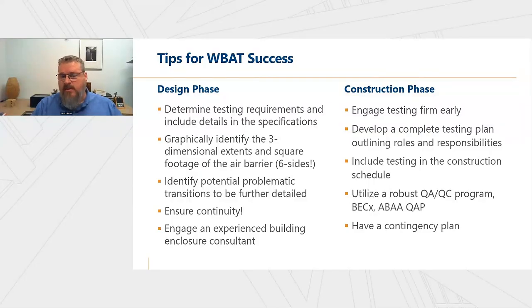early, even if it's just to do the planning and there's going to be a long time before it's executed, because you really do need that testing plan so everybody knows what they're going to have to do. You can line up schedules. You can build it into the schedule for the building